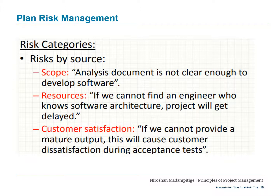Other ways of categorizing risks by source include scope risks — for example, if the analysis document is not clear enough to develop software, that is a scope risk. Resource risks — if you cannot find an engineer who knows software architecture, the project will get delayed. In a construction example, if you cannot find the right number of masons, that is a resource risk. Customer satisfaction risks — if you cannot provide a mature output, it will cause customer dissatisfaction during acceptance testing, and you may identify this as a customer satisfaction-related risk during planning.